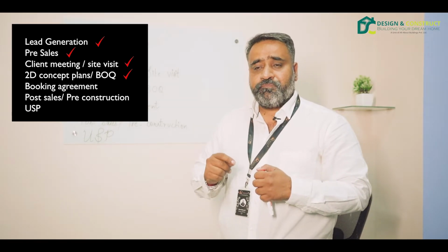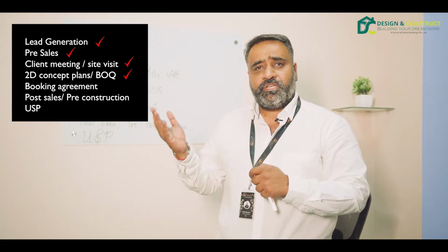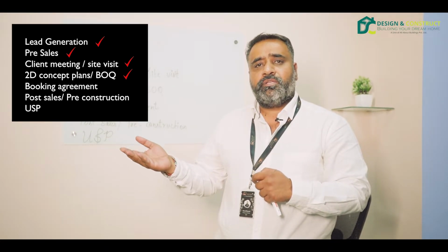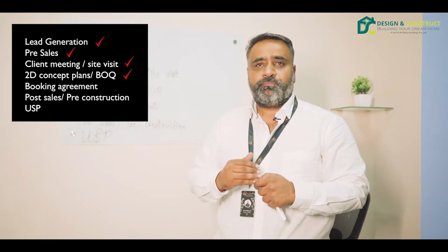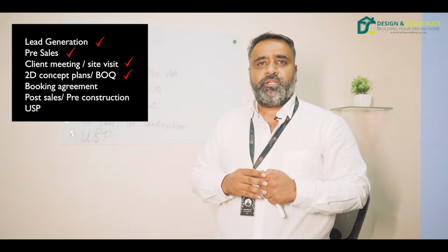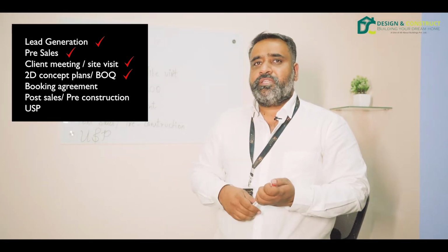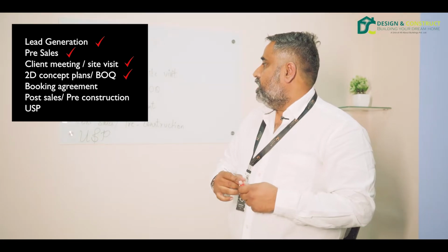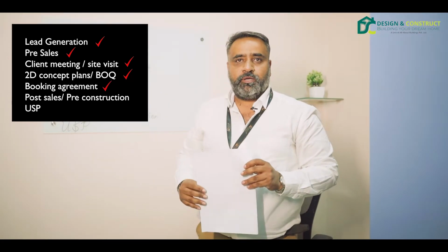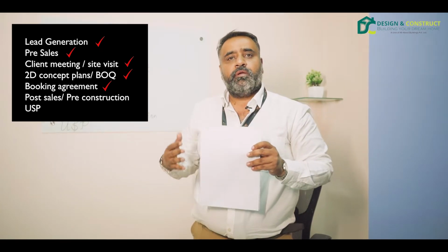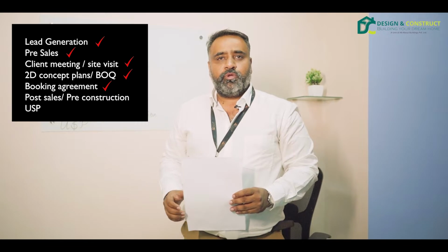Now, to give the tentative pricing to the client by the square feet area, for the elite package or the decor package, we need to understand the built-up area perfectly. So that is what the concept plan does. Once we get the concept plan in hand, we give the client a tentative quote and finalize the deal. Once we finalize the deal, the next step is the booking agreement. After the client finalizes the concept plan and the built-up area is with us, we go with the booking agreement,